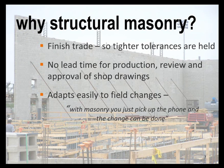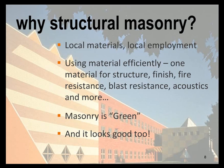Masons are a finished trade with very tight tolerances, which is incredibly valuable as you're working through interfaces and connections with other materials and building components. We really have no lead time for production, review, and approval of shop drawings. And the next point that contractors love to hear is that masonry adapts easily to field changes — though when I say you pick up the phone and the change can be done, they cringe a little. But truly, it can be that simple if you need to move a door or window — certainly simpler than many other structural materials.